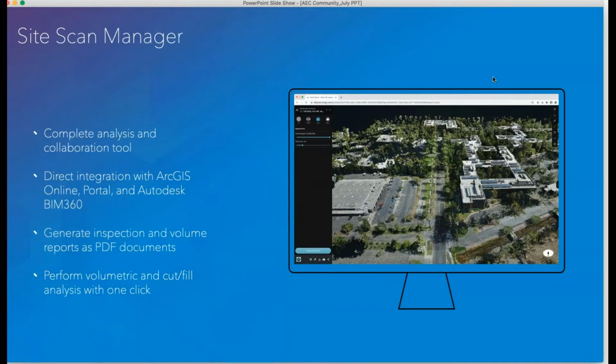As you fly a site over and over, especially during the earthworks phase, it's important to create regular volume reports and inspection reports. You can select an area and it'll dive through each flight that's taken place over that area and will generate the PDF report for you showing the change in volume over time.